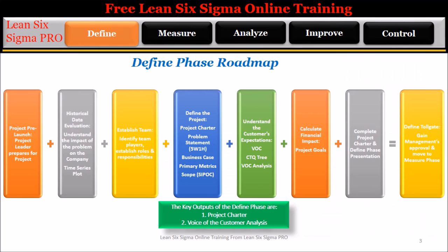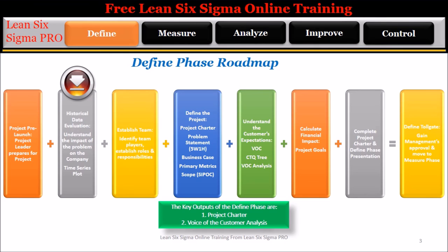The Define Roadmap is a summary of all of the steps required to complete the Define phase. Step 1: Project Pre-Launch — the Project Leader prepares for the project. Step 2: Historical Data Evaluation — understand the impact of the problem on the company. A time series plot is used to understand the trends of the data.